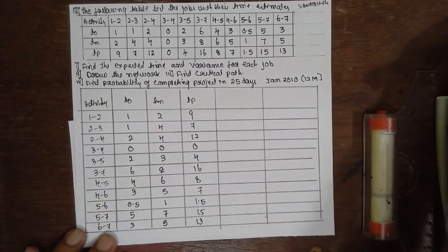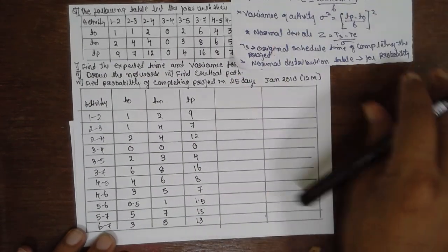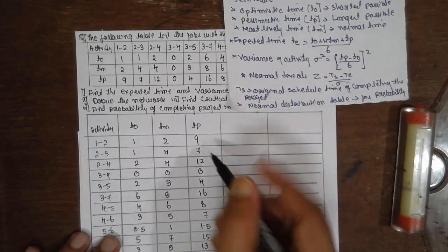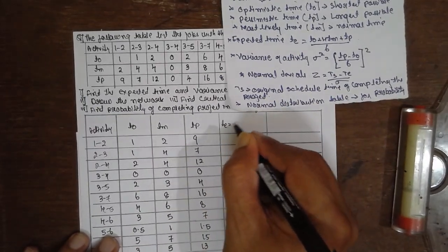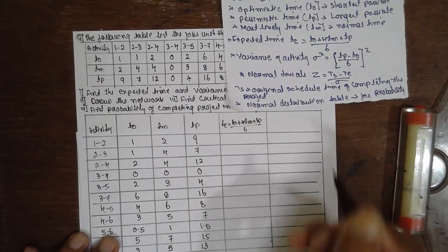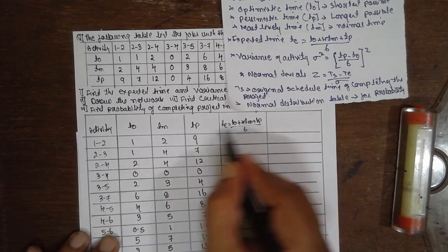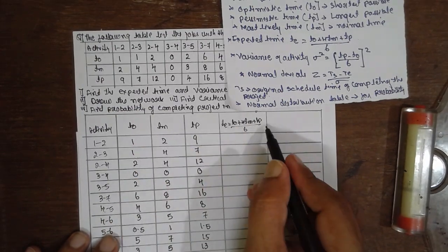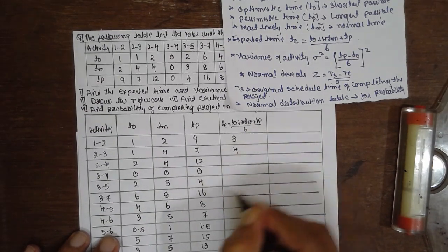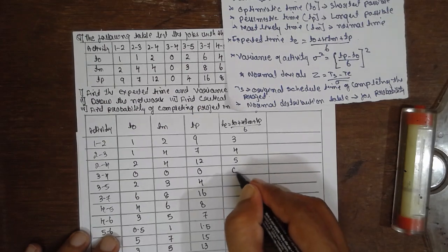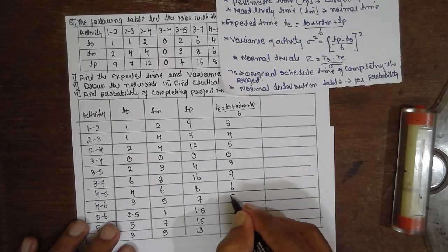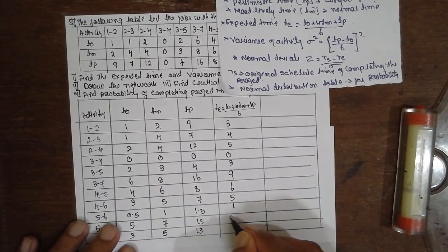Now we have to find out the TE value. TE is the expected duration. This is the formula. I am using the expected duration formula: TE equals T0 plus 4 times TM plus TP divided by 6. Now substitute these values. 1 plus 4 into 2 plus 9 divided by 6, you will get answer 3. Follow the same procedure for rest of the rows. The values are: 0, 3, 9, 6, 5, 1, 8, 6.